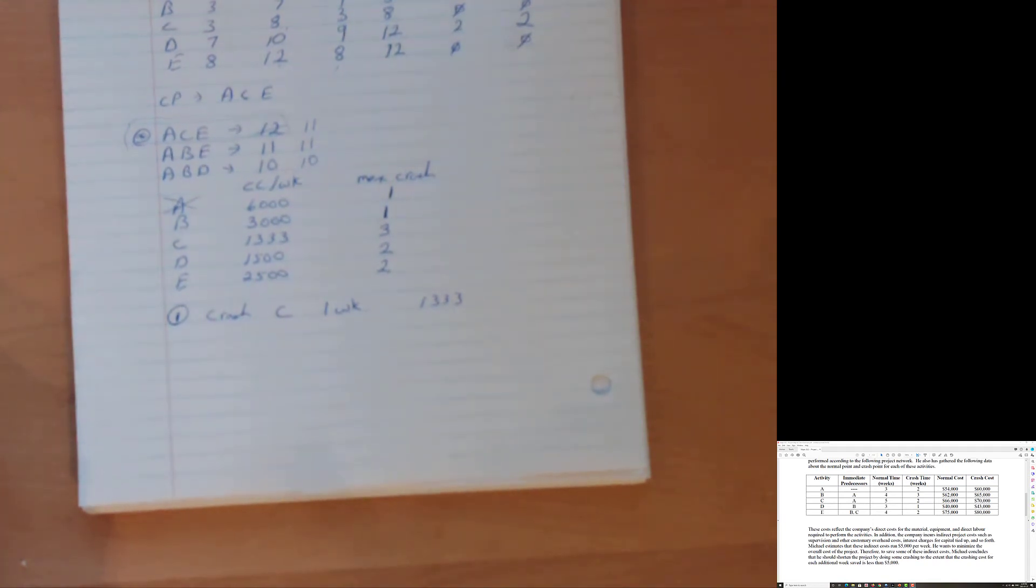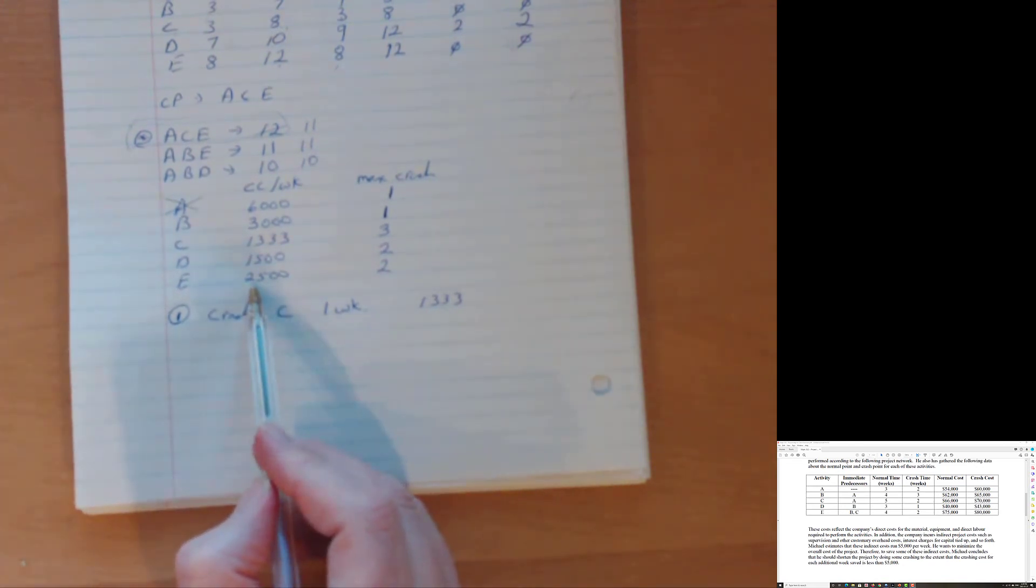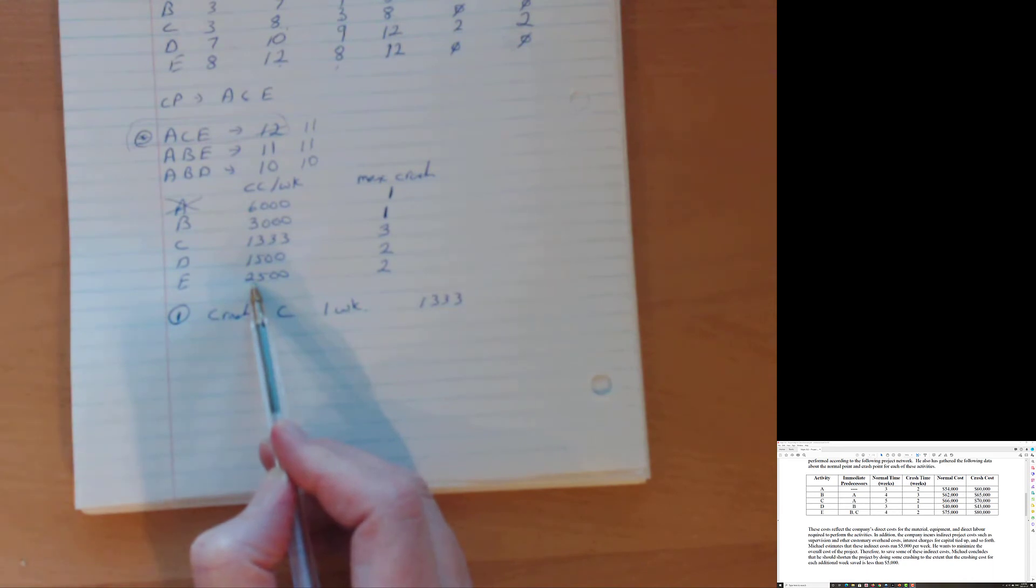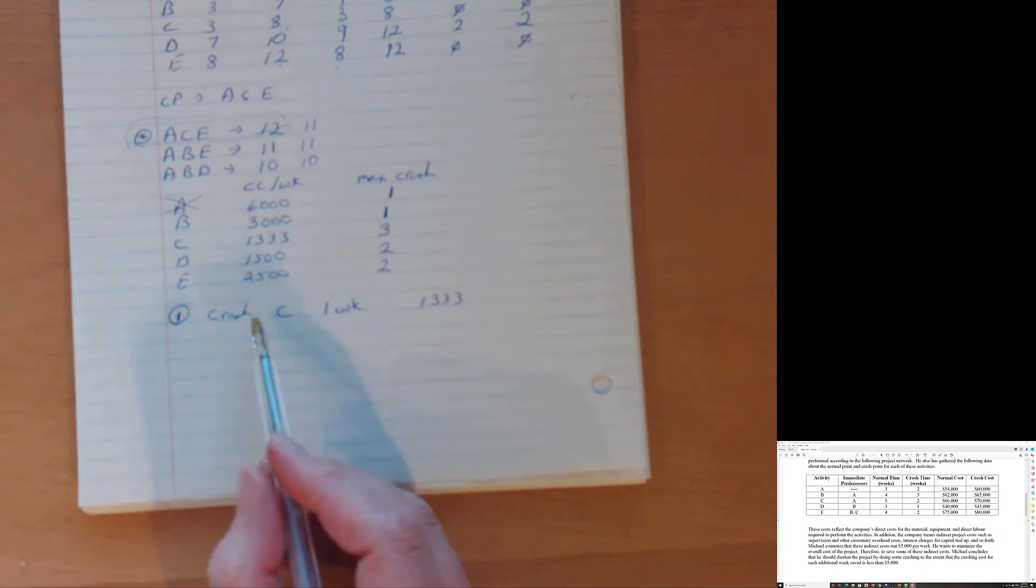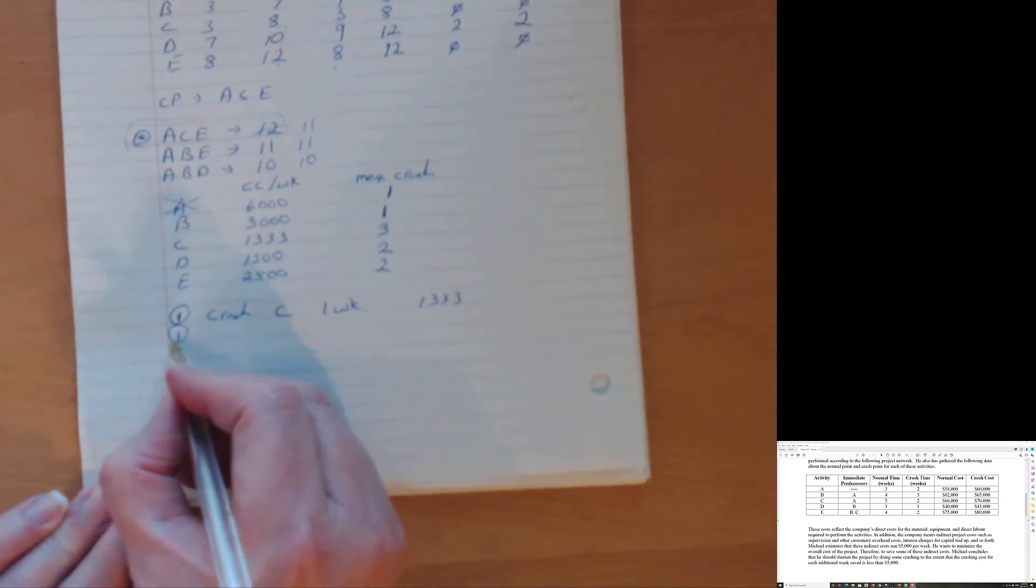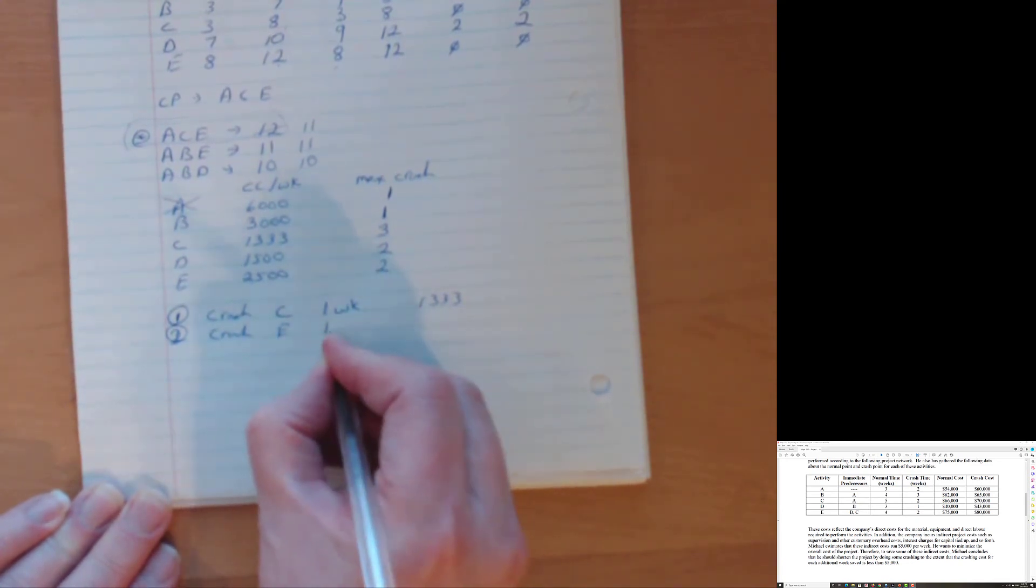So I have to think about, I got to think combinations or an activity that's common to both. Since we're drawing up a minimum cost schedule, let's think of an activity that's common to both. E is common to both. So E costs us $2,500 to crash. Now we know that we're going to save $5,000 by crashing for one week. So this is good. This is under 5,000. So step two, crash E one week.